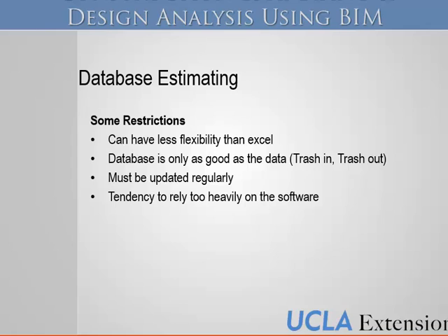Hebert? To answer your question, according to my experience, it's the estimator who puts together the schedule of values and gives it to the project manager, and that's the base of the budget for the project. So the project manager is responsible to control the cost, so he cannot go over that budget. And when he's going over, he will report to the estimator or the owner, and you will start making changes here and there to control that, so cost control. But it's the project manager who is responsible to control the budget. I think it's done on a monthly basis.